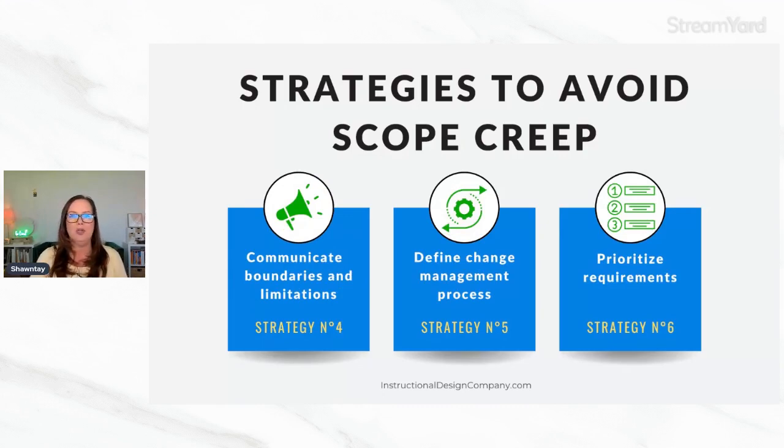So, for example, if somebody's saying, can't you just add this video? It's only going to take a couple of hours. Well, you can say, well, I really planned this project using 100% of my instructional design capacity to get this done. So I really don't have 2 to 3 extra hours. In order to make that happen, that means that we're going to have to either pull this out or we're going to have to extend this project a day, or maybe we need to pass this off to someone else who can do it.